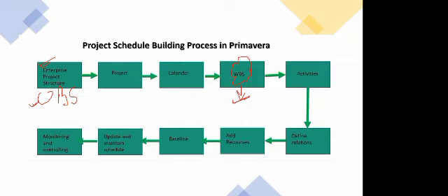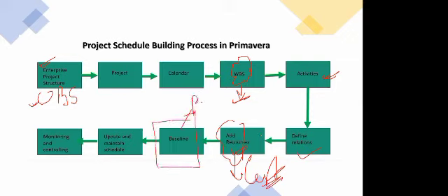उसके बाद you'll just add the activities inside WBS label, and then you'll define relationship, you'll add resources, and when I say resources, you again deal with the cost and everything, right? And then after doing all these things, you'll say that your baseline, or you can say this as a plan, is ready, right? So when you say baseline, it's nothing but a plan.